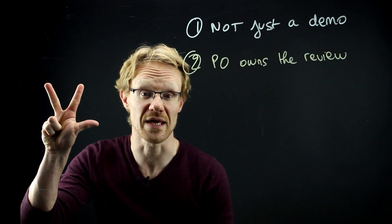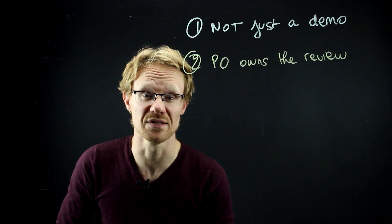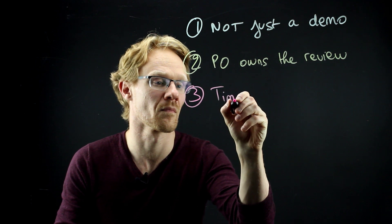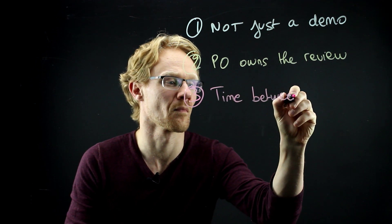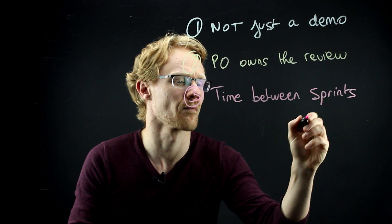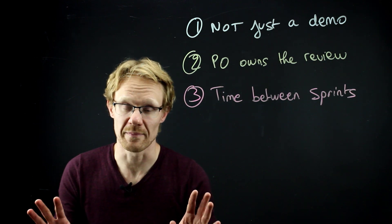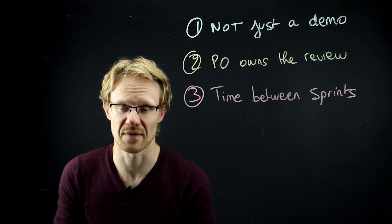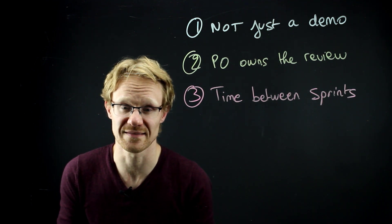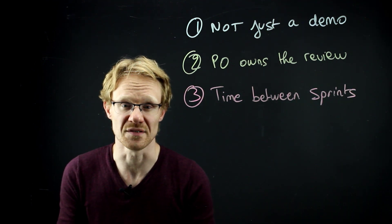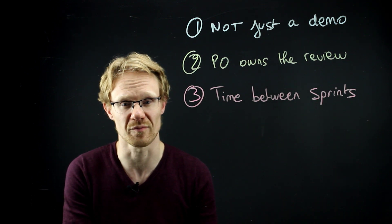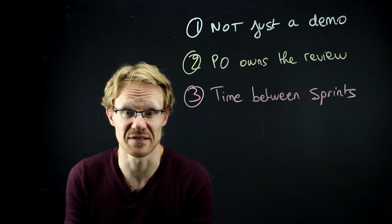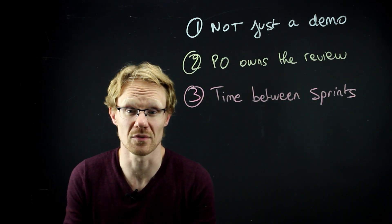Tip number three: allow time between sprints. Now, I know this might be a little controversial and the official scrum guide doesn't say that at all. I think you'll find in there a phrase that says the new sprint starts immediately after the previous sprint has finished. But one of the key principles behind the Agile Manifesto is sustainable development.